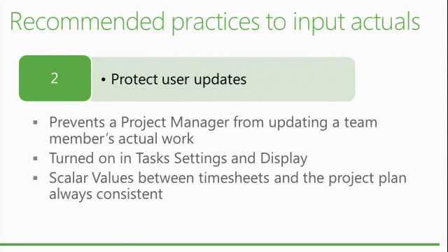That in some instances, the scheduling engine is going to distribute the hours, even the actuals, in a slightly different way than they were entered by the user. Because the scheduling engine is looking at future planning and that type of thing, as opposed to the timesheet, which is really capturing the data as it has been spent, in the past.